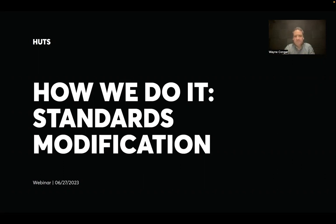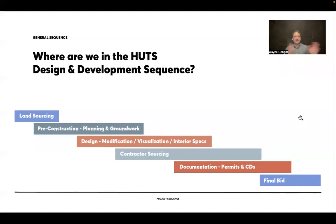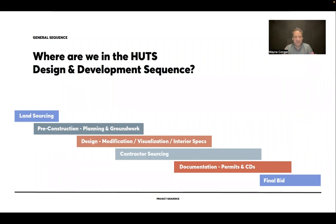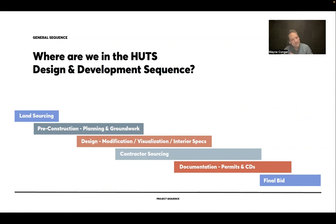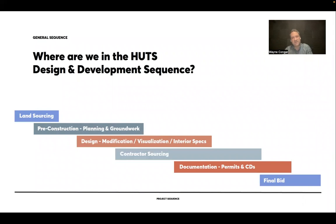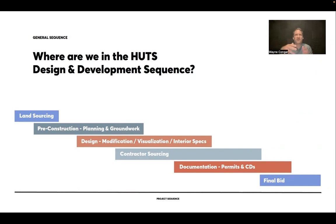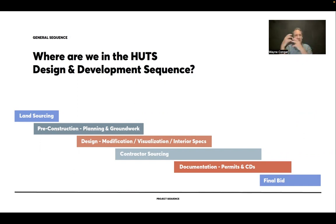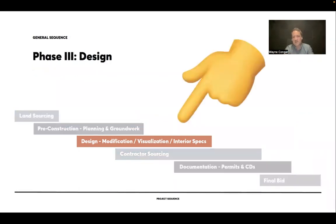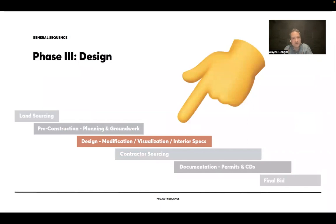So where are we talking about within the Hutts design and development sequence today? You can see this is a really stripped down version of what a pretty typical Hutts sequence looks like and the phases of work that we go through when we help our clients design and develop their property. In some cases, it starts with land sourcing, then going through planning and groundwork and improving a lot, then design, working with our standards, modification, visualization, interior specifications, contractor sourcing, documentation for permitting and construction, bid, and then into construction. Where we're talking about today is kind of phase three in our design, modification, visualization, interior specs section, and specifically modifications.